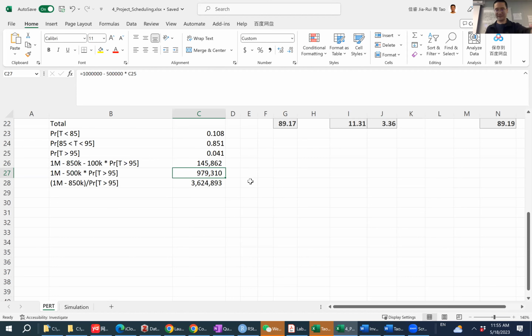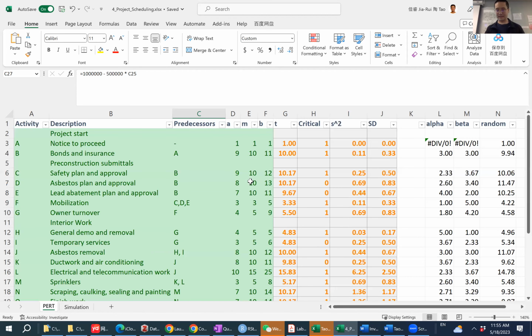It appears we got a winner team already. Okay, let's get started to review how we need to address these questions. Here I illustrated both the AOA and AON diagrams. And to find the critical path, we need to calculate the expected duration. So recall that from PERT, the expected duration is going to be A plus 4 times M plus B, divided by 6, right?